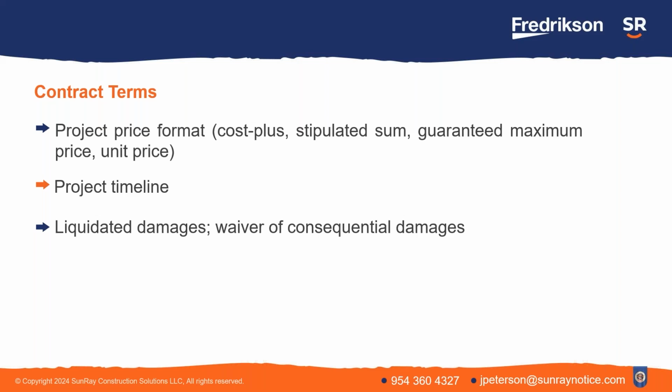So if you're piecing this all together, if you have a contract where consequential damages are waived and you have not agreed to liquidated damages, if you've delayed your work and you're late in delivering the work, the project owner will have no remedy against you for delay damages. So that would be a great contract to negotiate, because then you'll get paid the full amount even though you're late. Most owners are going to push back at that if they're sophisticated at all.